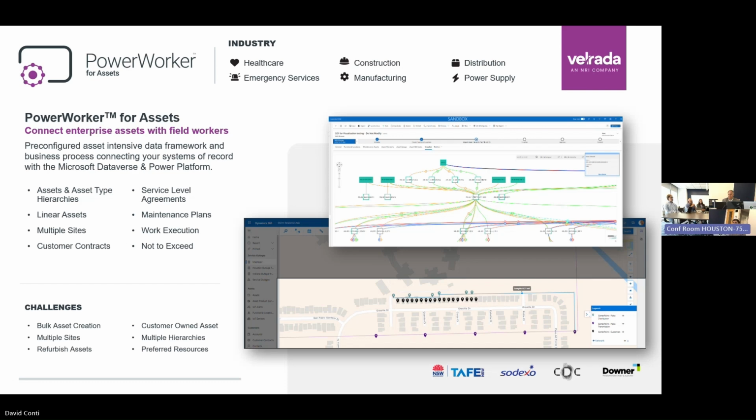So I'm best to try and organize as much maintenance on that pipeline to occur at the same time, rather than saying each week, well, today we're working on the well, tomorrow we're working on the pad, the day after the pipeline. That's too much outage. We bring through the visuals to try and help you understand the impact or the blast radius of an outage that you're planning, and then kind of plan that maintenance to get it in the right order to minimize those sort of downtimes and make sure you're meeting those levels for your clients as to your production output as you go along.